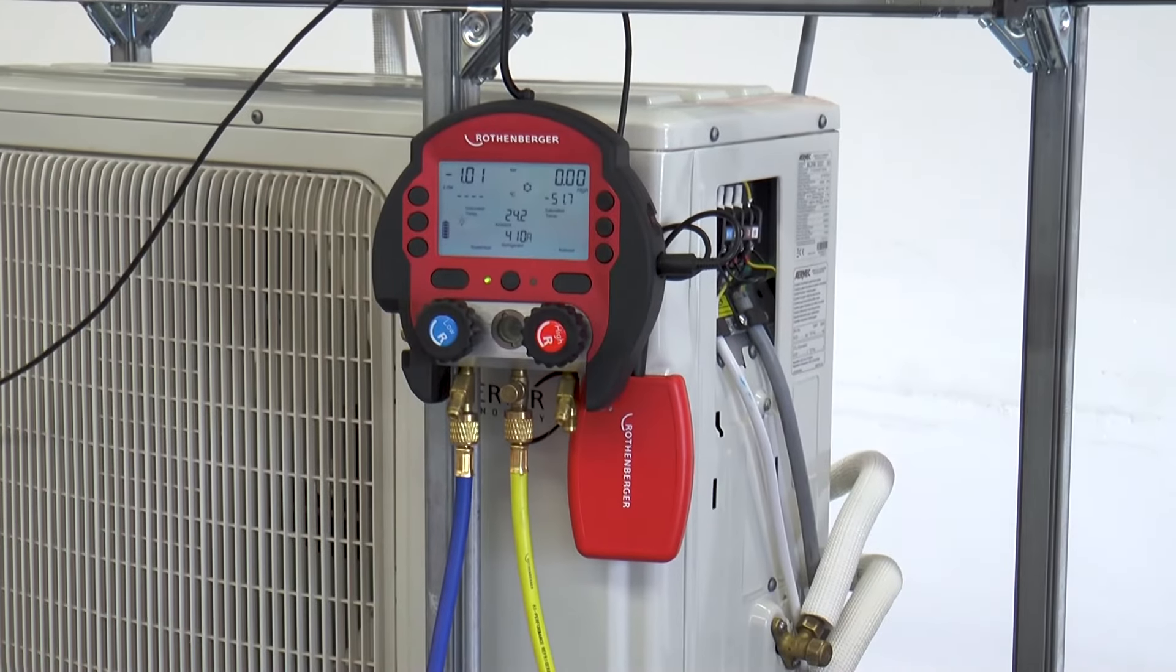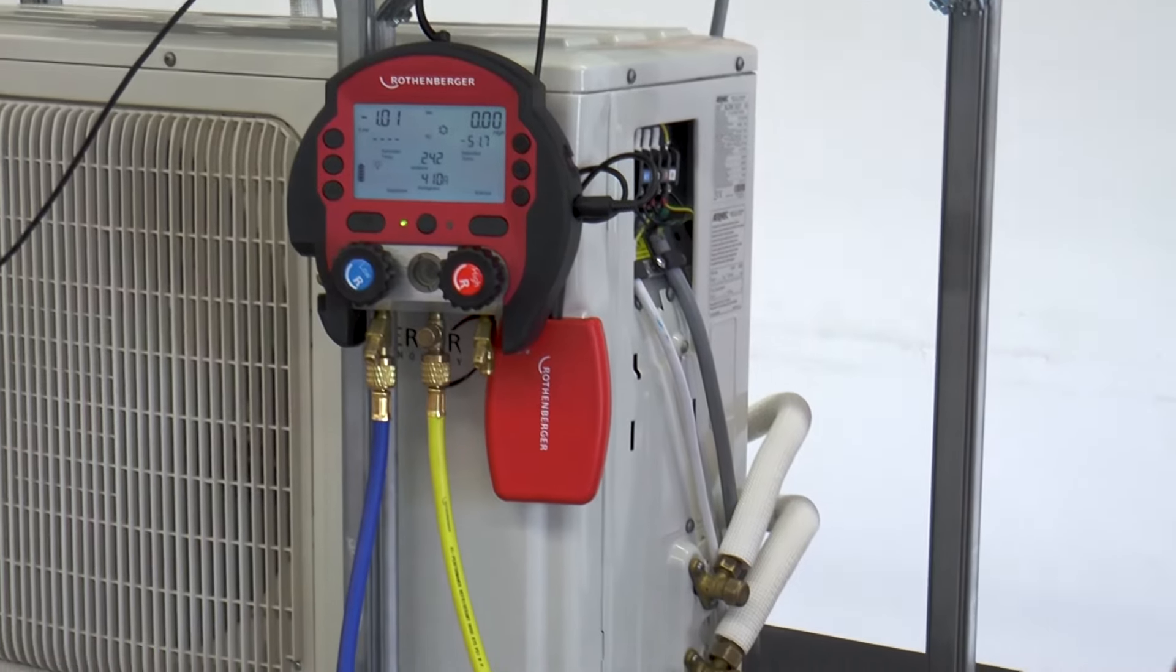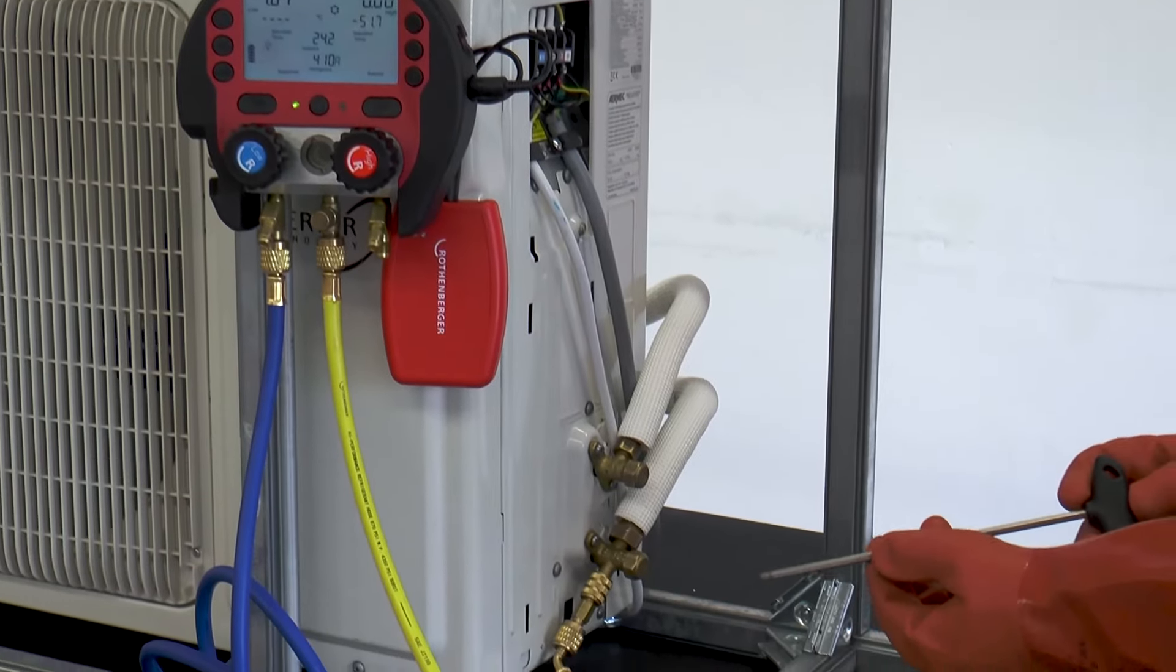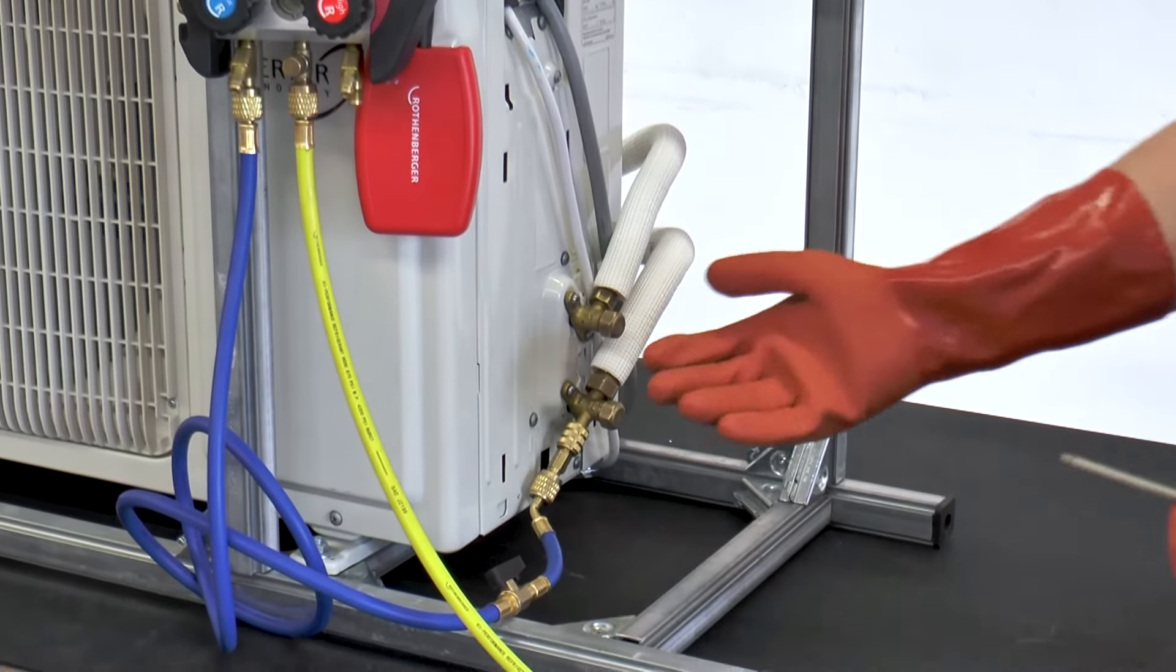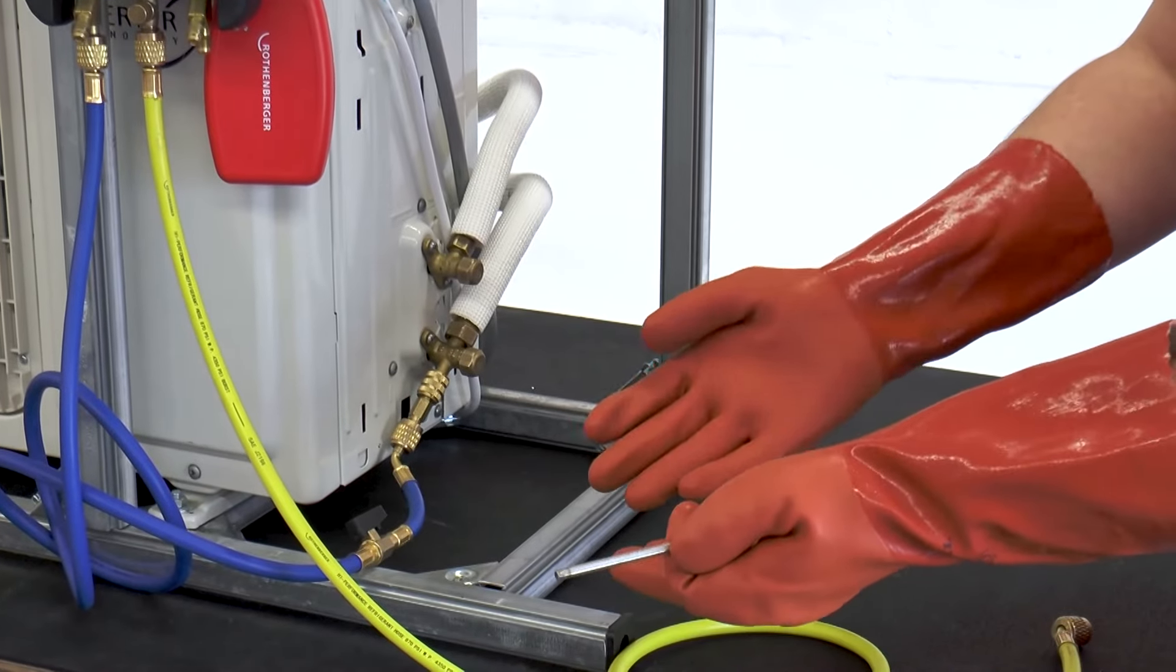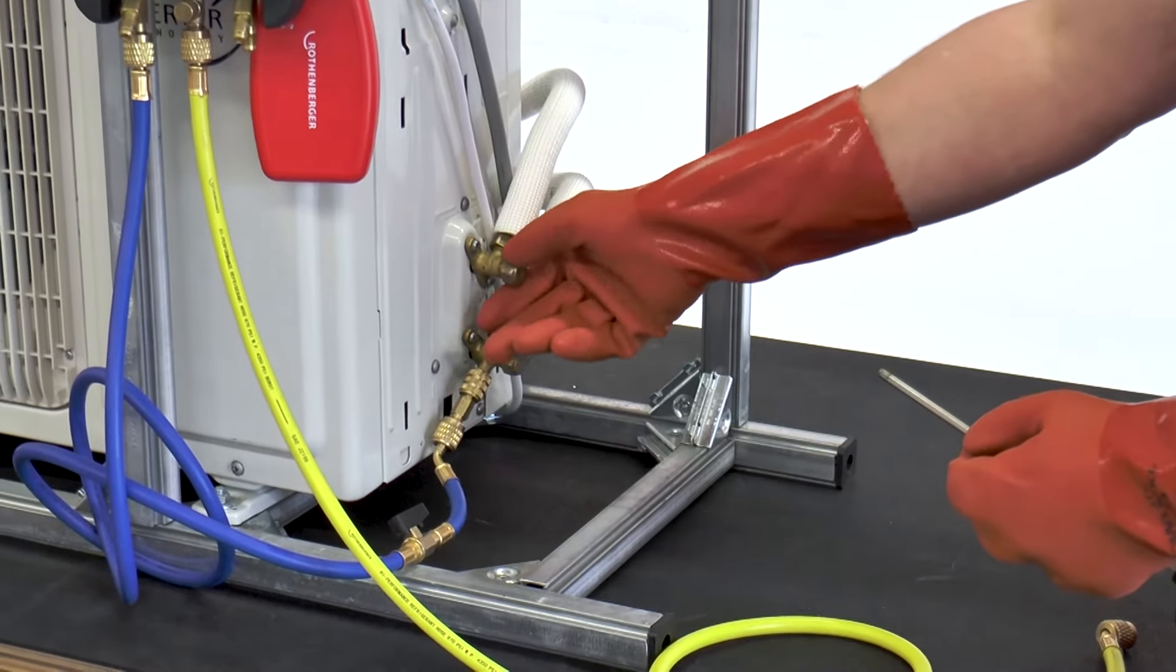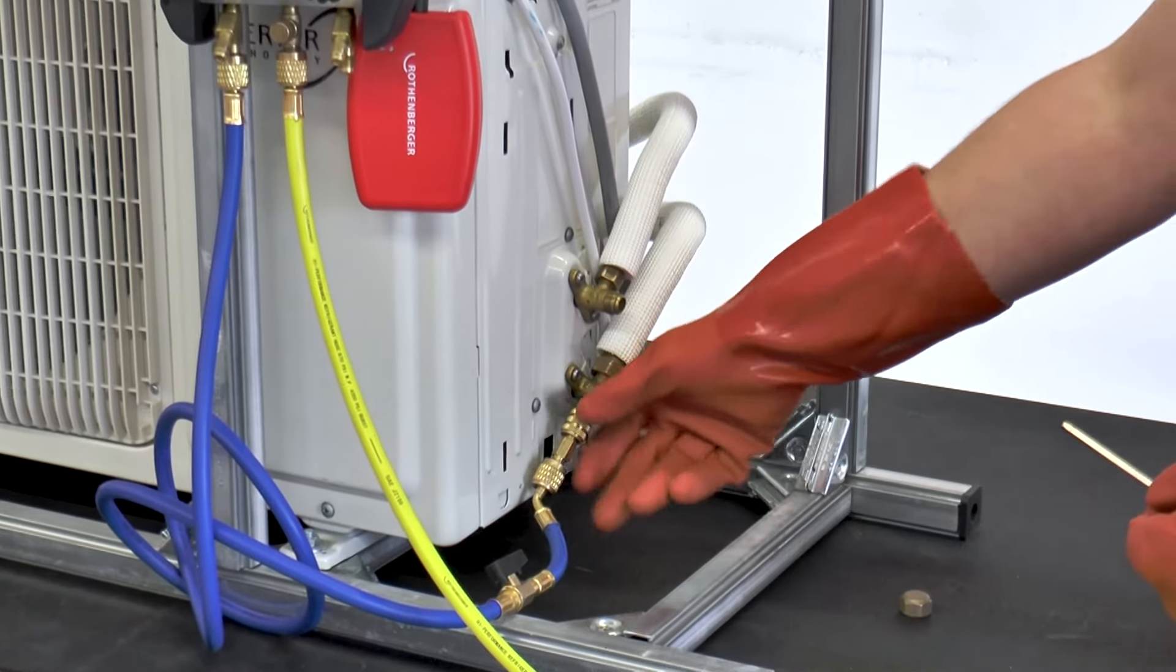This means green light to flood the system with refrigerant. Next, use the appropriate Allen key to open the grub screws in the direction of flow. It is important to wear acid-resistant safety gloves and safety goggles when doing this. It is also important to open the grub screws completely, as they have a metallic seal.